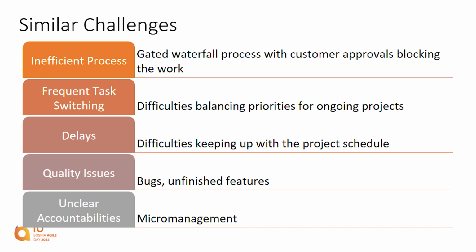And in the case of the bigger company, imagine a team that works on multiple projects, each project having its own project manager, and the project managers pulling each in their own direction. There you have task switching, unclear priorities, and all of this brings also problems with the quality, so higher numbers of bugs or technical debt created.